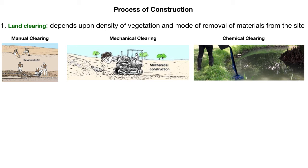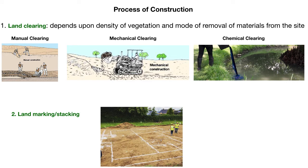Chemicals are also used to eradicate unnecessary aquatic weeds. After the land is cleared, it is marked for the construction of various farm elements as per the layout plan. Dry white lime powder is used to show the positions of various farm elements like dykes, channels, and ponds to be constructed. This process is also called staking.